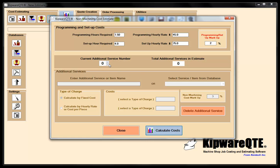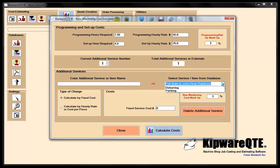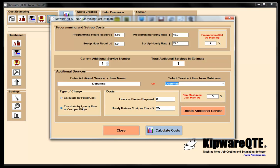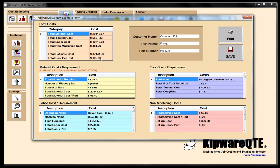There are other things you can do in non-machining costs — deburring, packing, plating, or anything else not machine-related. I'm going to add one just to show you. I'll add a service, and pulling down from my database I have deburring, done by hourly rate at $25 an hour. I'm going to say it takes a quarter of an hour per part. After calculating costs, you can see more non-machining costs added to the quote. That perishable tooling cost of $5,500 may not have been accounted for in a lot of shops — and it's a big ticket item. My total estimate cost is $37,000 to make 350 pieces, which is $106 per part.